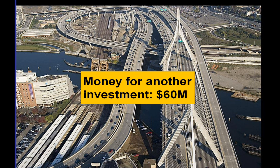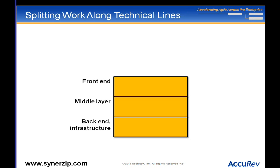Now let's get down to brass tacks on splitting. Often when people are trying to break things down to fit into agile, they think of breaking it into layers: I'll do the back end, the middle layer, the front end. But how much are you going to pay me if I get the whole back end done? Nothing — because it provides no value until the front end and middle layer are done too. So let's look at this another way: let's split by value.